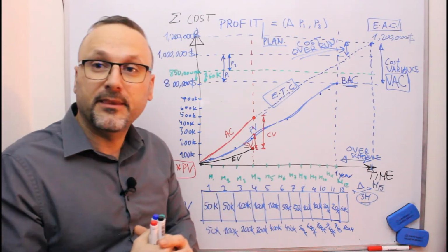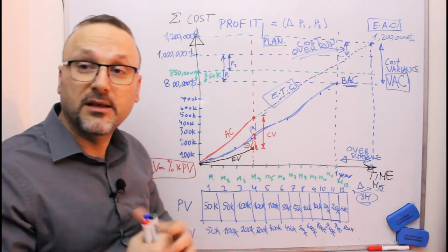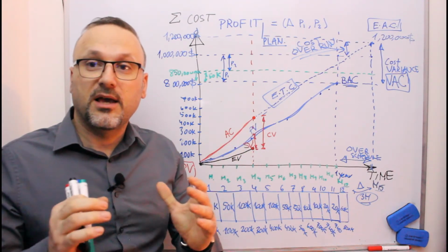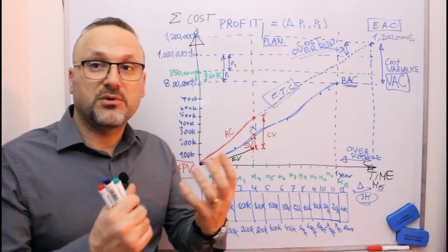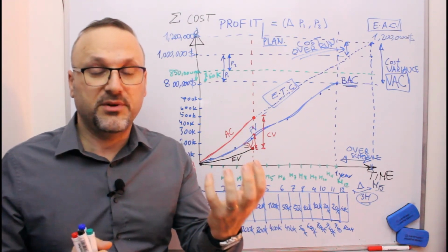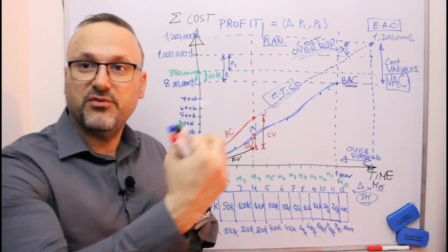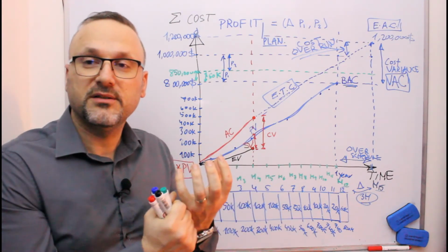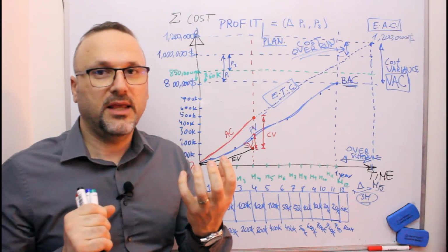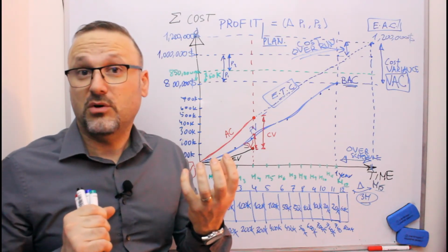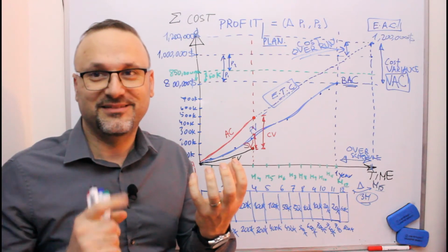Another way, if you are under, and you are saying, I planned today 100,000, your company prepares 100,000 for you. They take a loan from the bank and they pay interest for it. And you are saying, sorry, I overestimated and I need only 50,000.